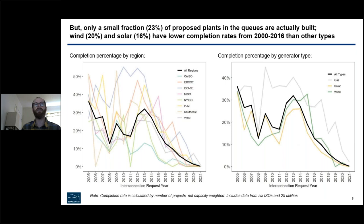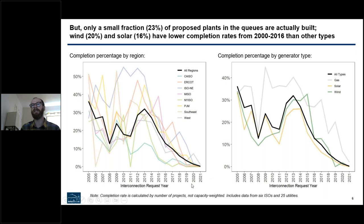Not all of the projects in the queue actually reach commercial operations. When we looked over time, just about 23% of all proposed plants that entered the interconnection queues were actually built. Wind and solar seem to have slightly lower completion rates over time compared to other types, especially compared to natural gas plants. These completion rates also vary not only over time, but also across different regions — there are some substantial differences.